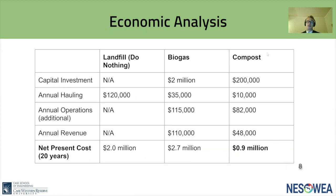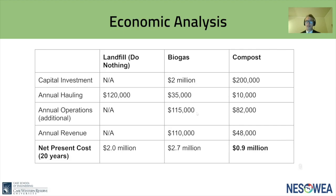Our team conducted a 20-year present worth analysis with a 2% inflation rate, generating a class 5 estimate. We defined landfilling as the do-nothing approach, which has the highest hauling cost. Biogas operators generate high revenue but also have the highest operating cost. Composting, with the lowest net present cost at 20 years, was the most economically favorable method.